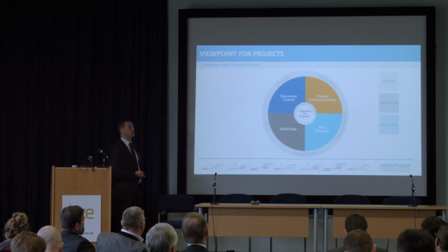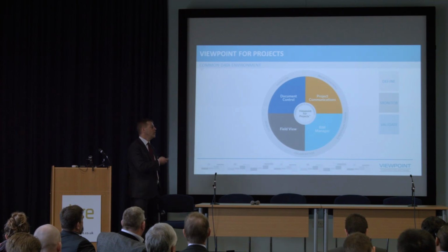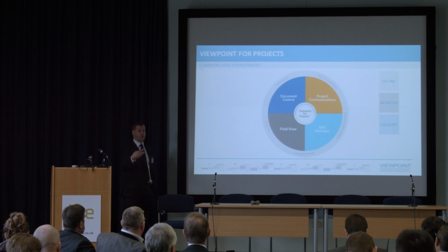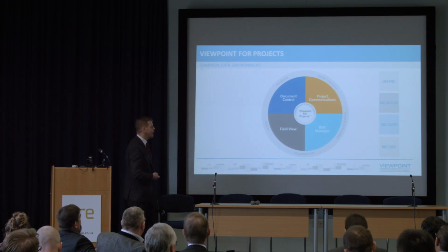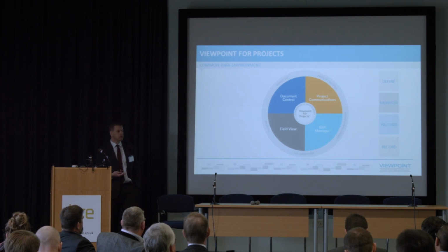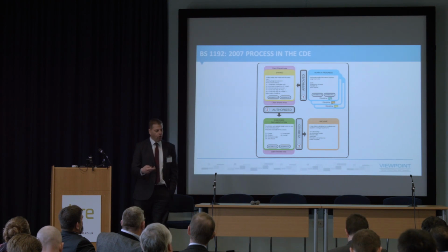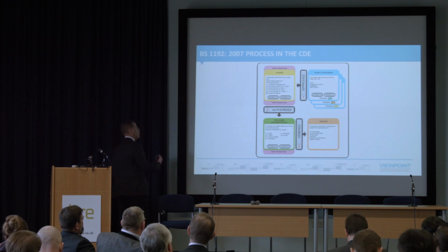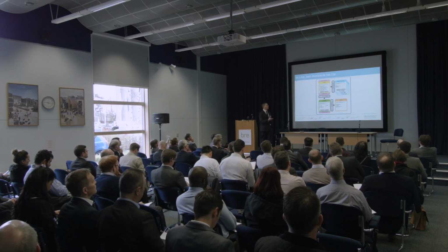Validation, so this is now actually just changed around verification and validation. So you ought to be able at least to verify whether the information coming in is in the format. You know, are we actually getting the data that we thought we were going to get? And, of course, it does need to be able to record what's come along. And, of course, part of the control of process should be tools to help you comply with the 1192 system of sharing information.